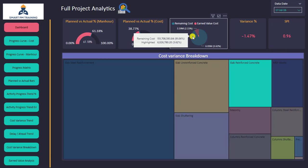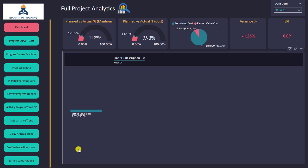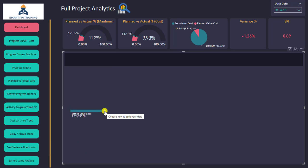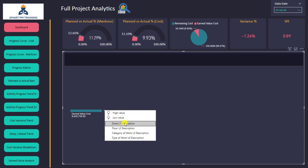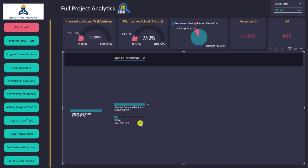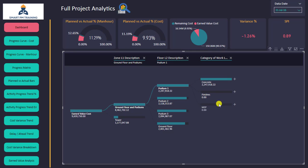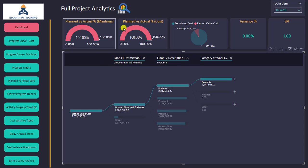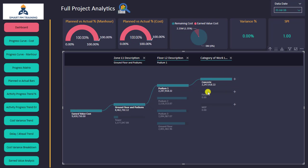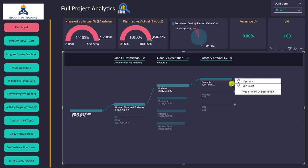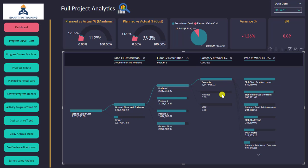Here I have the earned value cost — I can click the plus sign and see the breakdown of my earned value, sorted from highest to lowest. I can go deeper in the analysis to see floor-wise where my earned value cost is, and even more detailed — clicking on concrete, I can see the indicators updated and the path is highlighted, showing this value for concrete under podium one under this category.